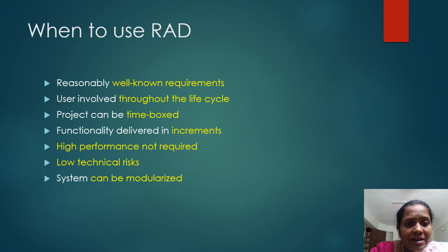So RAD is used when there are reasonably well-known requirements. User involvement throughout the life cycle. The project can be time boxed. Functionality can be delivered in increments. High performance is not required. Low technical risk.